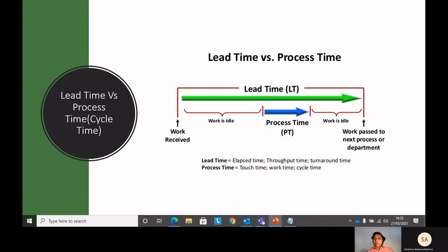You might have seen in our previous example where our code is ready, but it's not deployed into production, for whatever reason. Sometimes we have a window of 2 weeks or 3 weeks, sometimes we have fixed calendar releases. So we wait for that particular piece of code which is still very much deployable, but we wait for 2 weeks. That is when the work is idle, no one is doing anything for that. So how can we reduce this lead time? That's how all businesses work. How to reduce this process time, how to reduce this lead time, that should be the ultimate goal.